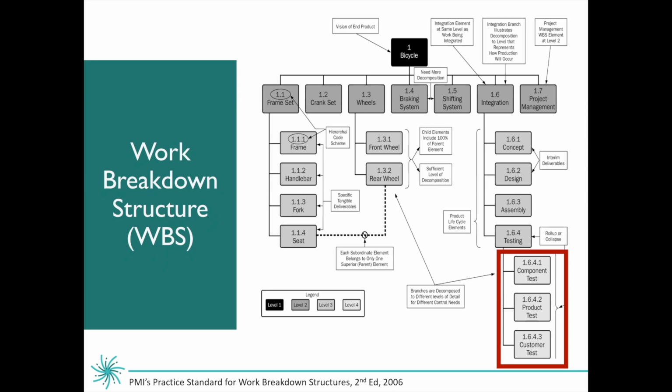And this is the level where, in this case, they can accurately estimate that cost, the schedule durations, and assign resources. One more tip that I'd like to provide you with: wait until you're completely finished creating your work breakdown structure before you start numbering.